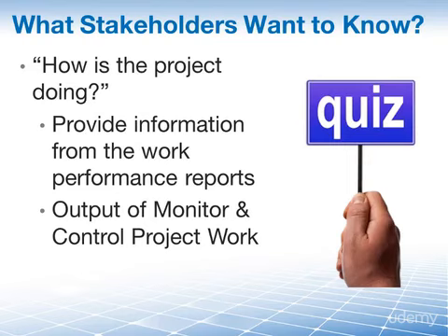The work performance reports will give you the information which you should analyze, and you can then present that to provide the appropriate context or explanation for the results. If appropriate and the information that you have warrants it, you may also request something of your stakeholders in return, perhaps a change request for a schedule change or a request to use management reserves.